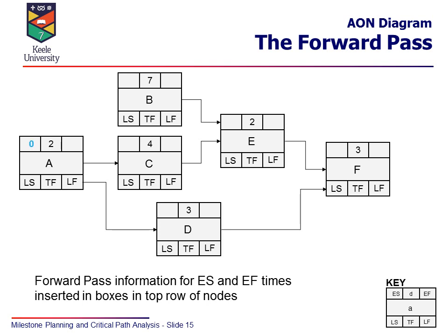So the first figure we put in at the start, activity A is the start of the project. Start on day 0, takes 2 days. I'm just trying to remember what it was. Yeah, it was days, so it takes 2 days to complete, and so the earliest that activity can finish is on day 2. Likewise, activity B has no predecessors, so can start straight away. The earliest it can start is at the start of the project, and then the blue figure animating in there is to say that the earliest finish time is day 7.